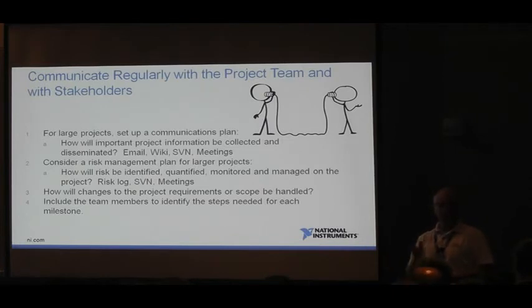Hey, up front, we've got extra work going on, but it's going to flatten out after a while. Or maybe you're going to find that, to Ryan's point earlier, you spent 90% of your hours and you only have 50% of the work done. Raise the flag. Communicate with management, with the team members, with clients about issues that are going on and progress that you're making. Have a risk log and identify risks and possible mitigation plans.